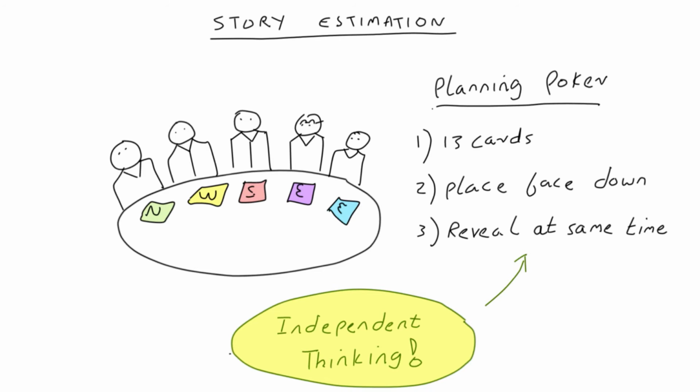And it is also important to remind team members that they're not just estimating their portion of the work in the story, but they're estimating the total amount of work involved in the story. So a tester should not just estimate the amount of testing work done, but should be estimating everything.